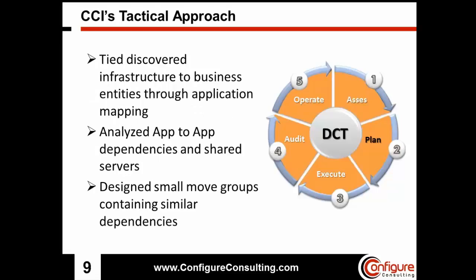Our next phase was planning out the migration. We had a tremendous wealth of information now within our database regarding the servers and the server-to-server dependencies, the server-to-database relationships, everything stored within our database. But what we needed to do is tie that discovered infrastructure to the different business entities that exist within the organization. Now I saw a number of people raise their hands to say that they have previous experience with UCMDB, and if you're still working within that organization, you may have already gone through the application mapping effort. If you have a mature UCMDB, that's likely to already have taken place.